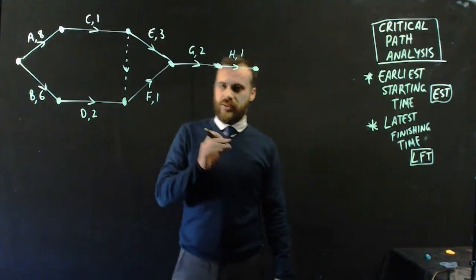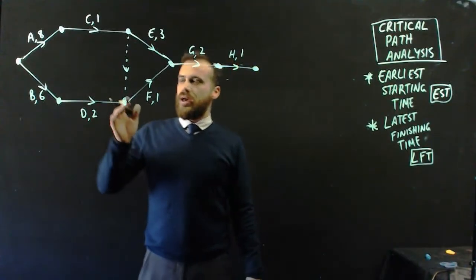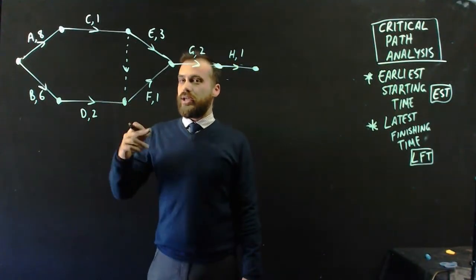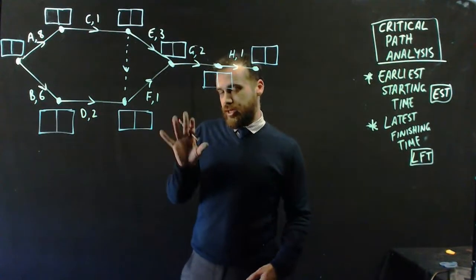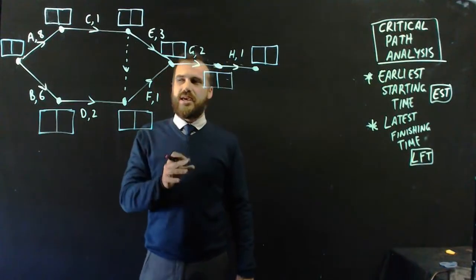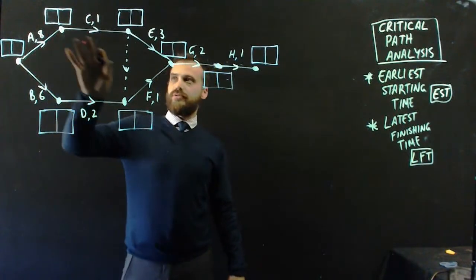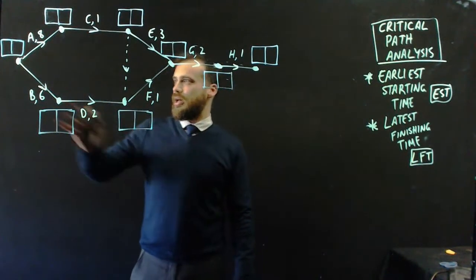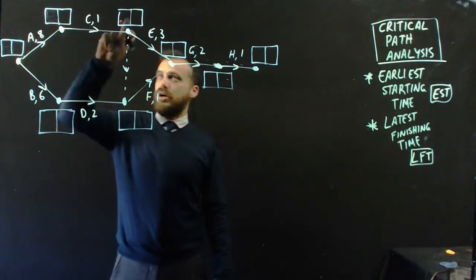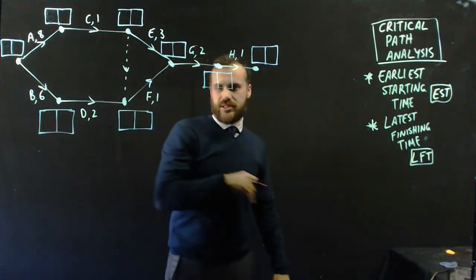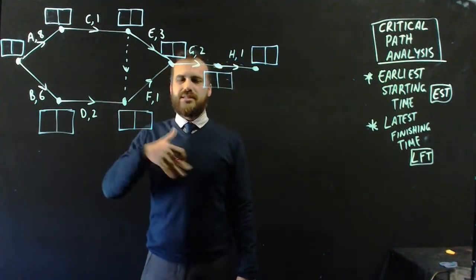Earliest starting time. And the question you have to ask yourself is, what is the earliest that I can start each of these activities? Now the best way to figure this out is through a process called forward scanning. You can see I've drawn in all of these little double boxes here at each of the vertices. On the left hand box, I'm going to put the earliest starting time, the earliest that the next activity can start.